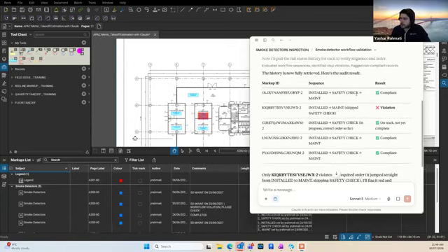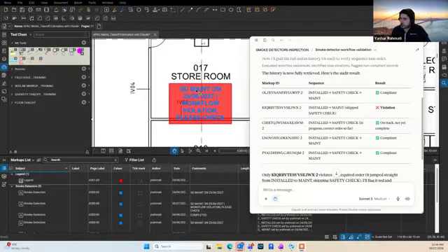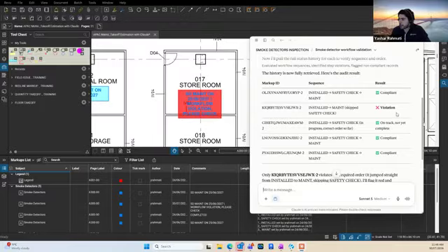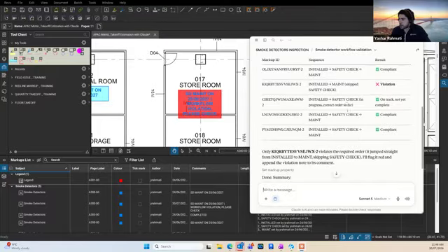All right, so now we can see the first one installed, the safety check has been completed, and the maintenance has also been scheduled. But this markup here, which turned red, we can see there is a violation here because the installation is completed, but the safety check has been skipped. The maintenance is scheduled, but we didn't run a safety check for that. That's why we've got that markup color change, and also we get the result as well.